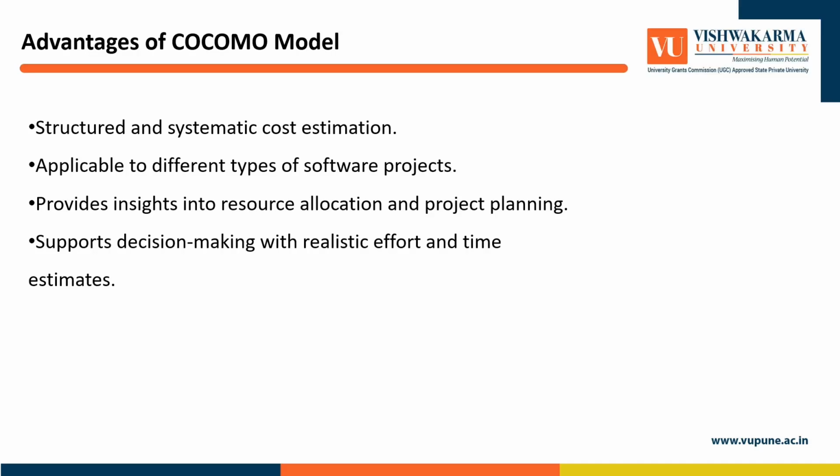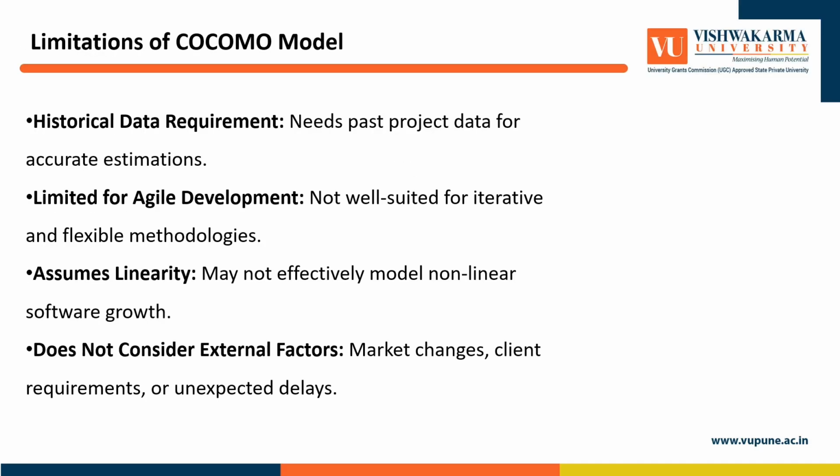Limitations of Cocomo model. Despite its usefulness, Cocomo isn't without its limitations. It's based on the waterfall model, so it's less suited to agile or DevOps environments. It requires estimating lines of code early, which is difficult in modern practices.